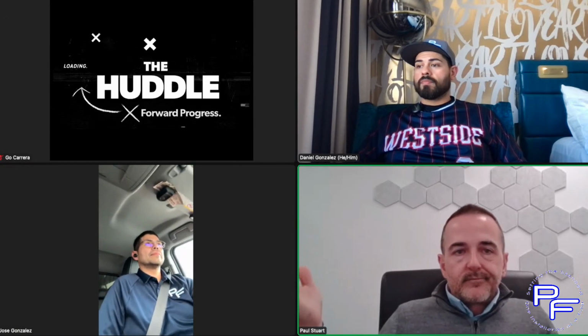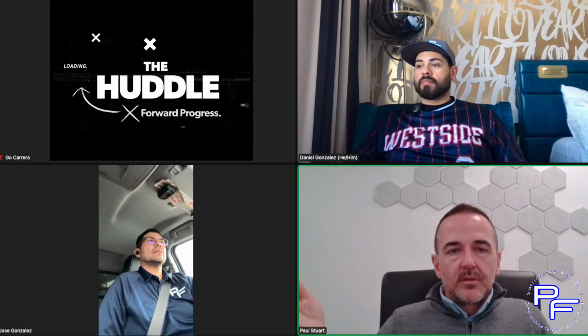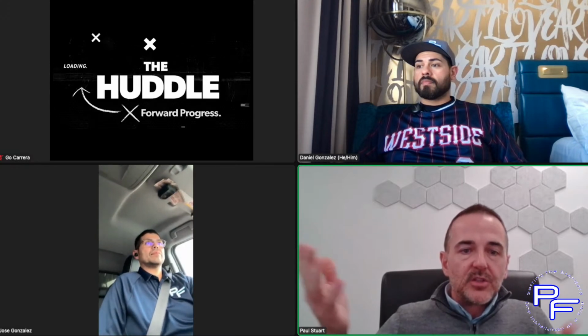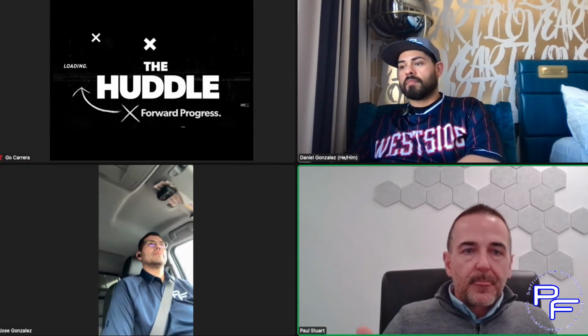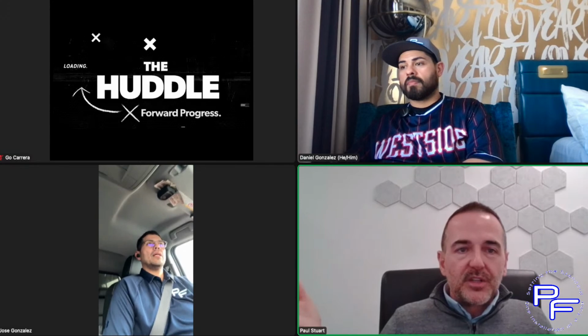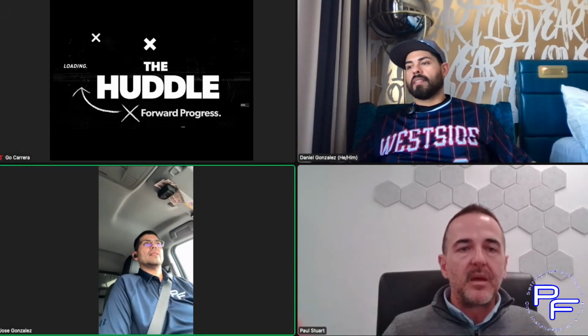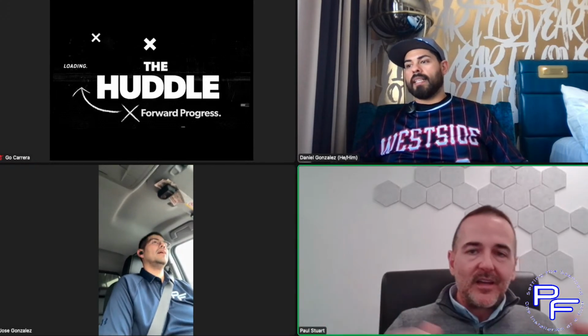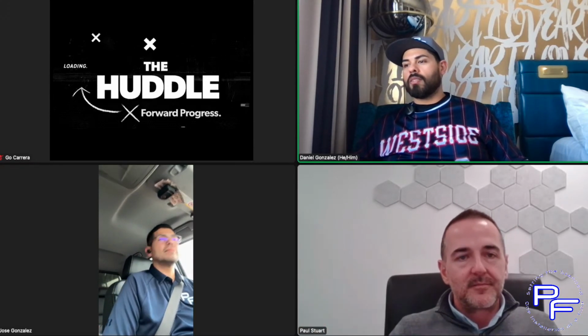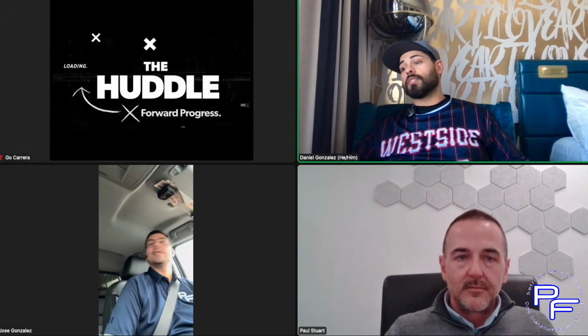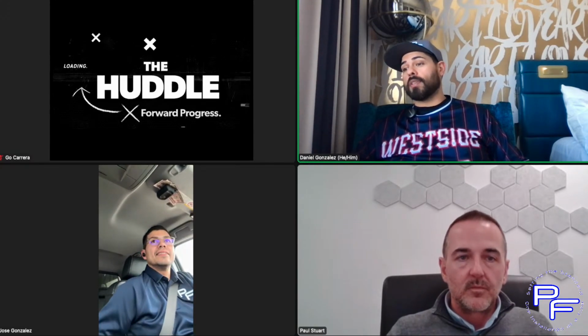Oh, it's funny, you just reminded me of a conversation there. Which way do you go? If all things are equal, like it's a good set of elevations and a good finish schedule, which one do you trust? So we'll find out which one's the cheapest and submit on that. And once they figure out, oh no, we wanted this, we say, oh, we already won, so this is the change order for this then.